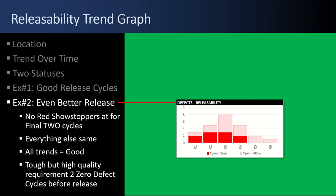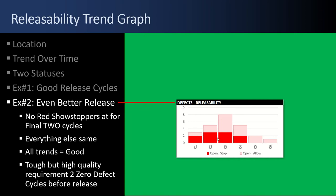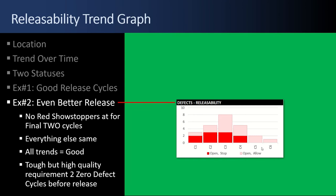Example number two, an even better release. There's no red showstoppers for the last two test cycles. You get two test cycles in a row, especially if you're fully regression testing everything. That's fantastic. You have a good solid, stable release. And especially if you fully regression test everything both times and you're doing exploratory testing in that last cycle, that is like gold standard. The open allowable, there's some there. It'd be perfect if those went down to zero, but perfect is the enemy of good enough. All the trends are good. It's tough to do this, but that's high quality to have two zero defect test cycles.